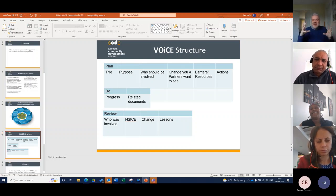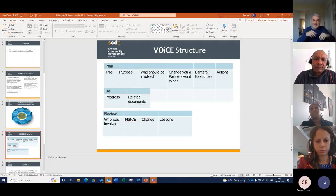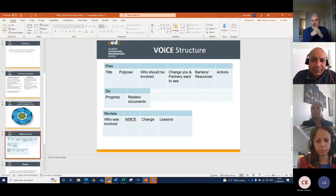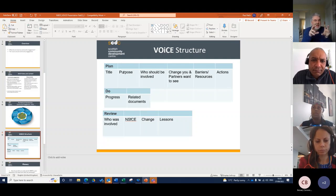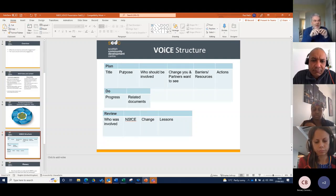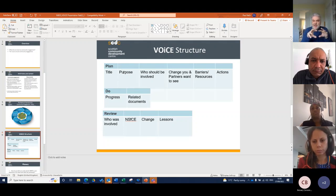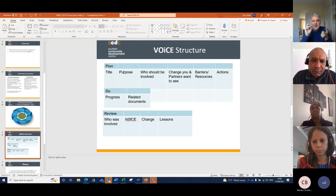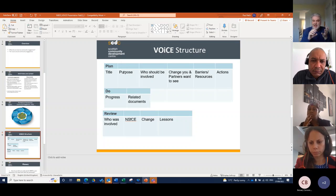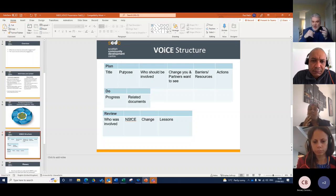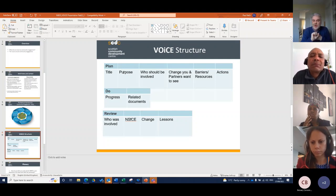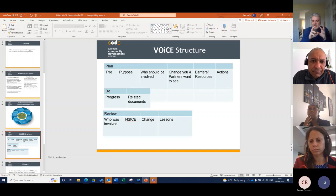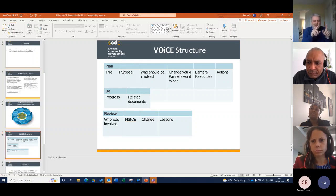You might have the statutory sector, private sector providers all in the room having a discussion about wraparound childcare. And as that's all happening, you're maybe dipping into this tool three or four or five times within that period just to put in here's what's happened. No plan goes to plan. Because something else came up within the community, we had to reschedule. We couldn't get the community centre for that date. We didn't get the response to the survey that we'd hoped, we're going to have to try something else and maybe rejig it. So it's about recording it in the Do section.